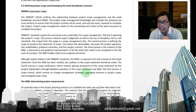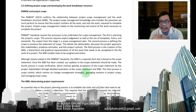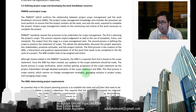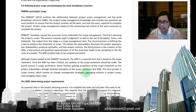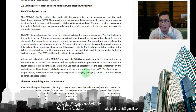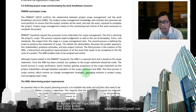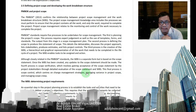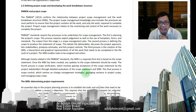The PMBOK standards require five processes for scope management. The first is planning the project scope. In simple terms, the project scope defines the limitations of the project — for example, whether you're building a one-story building with a loft, a one-story building only, or a multi-story structure. This process requires expert judgment as well as the use of templates, forms, and standards. The output from this stage is the scope management plan.